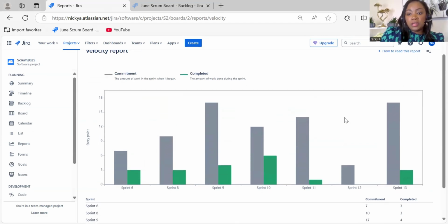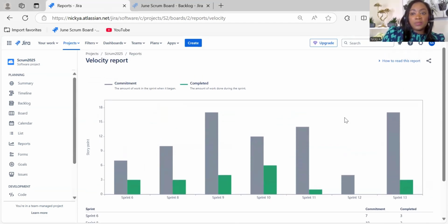Now I just noticed something. We're about to plan for a sprint, but we have not closed our other sprint that's ending. So what I need to do is close out the other sprint first so I can get an accurate velocity, because when you're planning, you want to get velocity from the previous 3 sprints. Okay. So right now I want to close out this current sprint so that velocity can also be added in my Jira report. So let's go back now to our Jira board again.